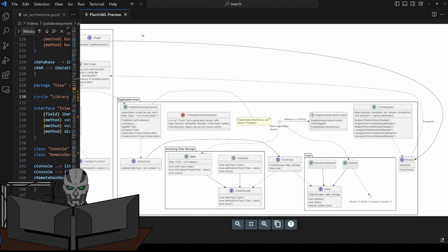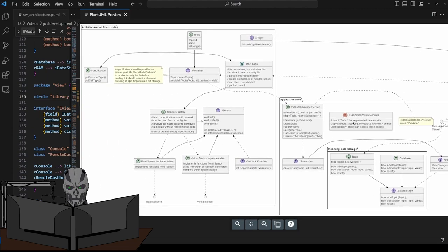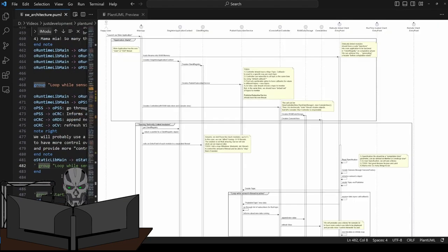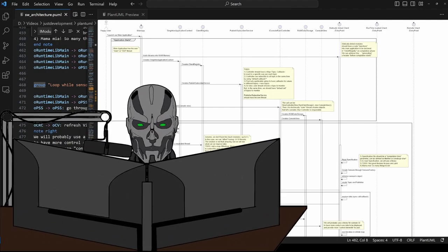Otherwise, we have already written some requirements. Based on the requirements, we have created two diagrams with classes and some dependencies, and also a sequence diagram based on these classes. I think that now we are ready to fill in our backlog with epics. We will split the work into different stages based on our work breakdown structure. And after that, we will plan our work in Jira, what we should start to do first, and what our expectations are, etc. So the next step is work with Jira.